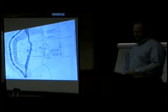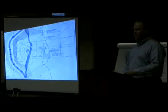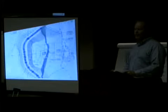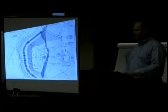The review consultants have a bit more to say on that matter, but one of the other important aspects of the bypass culvert is if we elect after a growing season or two to put water finally in our relocated stream, and there is a significant storm forecasted, we actually have the flexibility to reuse that culvert and maybe give it a bit more extra time if we think it's needed. So it offers a lot more flexibility to the plan than we originally had putting a bypass culvert in there.